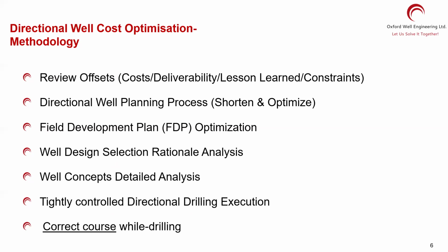And the last one, you should be able to correct the problem when you are drilling. If you are not getting, for example, the buildup rate, don't worry about it, because you cannot do it. Mother Nature is not helping you. You can have a plan to correct it. You can say, okay, I will do this in a tangent, or I will build it later, or I will kick off deeper next time so I don't have to fight with certain issues. So you can correct the course when you are drilling. While you are still delivering the well, you should be able to act on it. You could not do it if you do not have a tightly controlled system going for you.